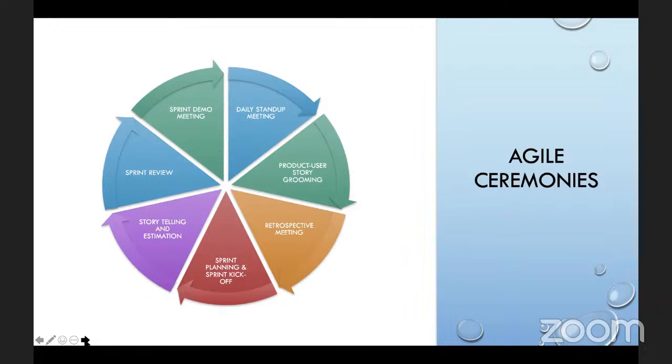And of course, we also talk about the payment gateways and APIs that we need to integrate: PayPal, Visa, MasterCard, all the other preferred methods of payment that we need to support. So we talk about all these things, and then essentially we get the story fully fleshed out, right? We add more details to it. All uncertainties, unknowns, risks, and assumptions are talked about at this step. That's what we call grooming. We are grooming the story to a level that we can all appreciate and say it's ready, now we can develop it, right? So that is the grooming session.